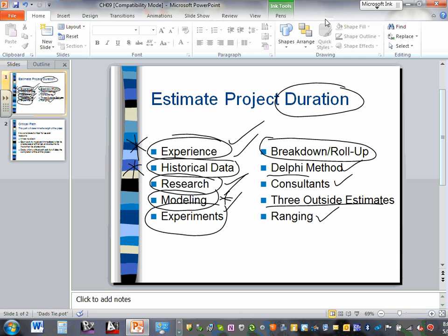That's so important, guys. We take our project. We have a goal for it. The goal is divided into objectives. The objectives are divided into tasks. The tasks are divided into activities. For each activity, we assign the earliest possible start time and the duration based on experience, and then adding that duration to the earliest possible start time will give you the earliest possible finish time. Any comments, my friends? Any questions about this? Cool? Makes sense?